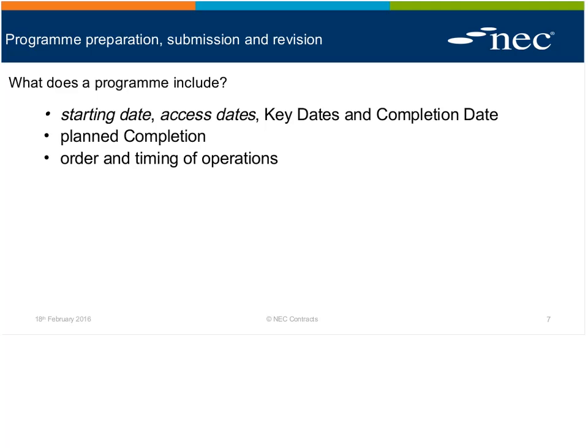So the planned bit is in the hands of the contractor. The contractor says, I know what completion looks like, because hopefully it says so in the works information. Yes. Then he needs to represent on his programme when he actually plans to achieve that state called completion that you've written into the works information. Absolutely. The completion date is the contractual date by which the contractor must finish or else face the prospect of delay damages. Absolutely, and Rob, as a fellow examiner, you probably share my frustration when you see additional defined terms being chucked in, like partial completion, practical completion, substantial completion. We don't need these because they're nothing but trouble. As usual, read and follow the contract, not people's contract.